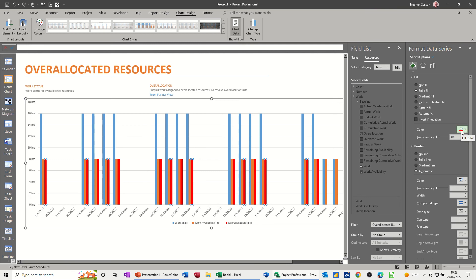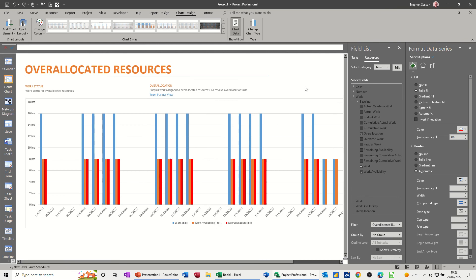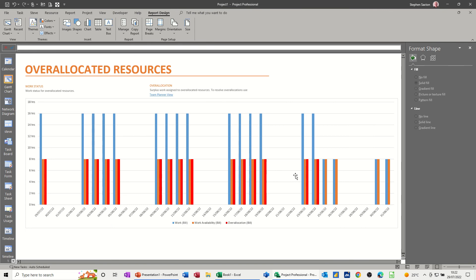Solid fill, and it's picked up the red that's already there. So over-allocation for Bill is red. So this is only showing Bill, because Bill is the only one that's over-allocated at the moment on those tasks. These two guys are not, or these tasks are not.